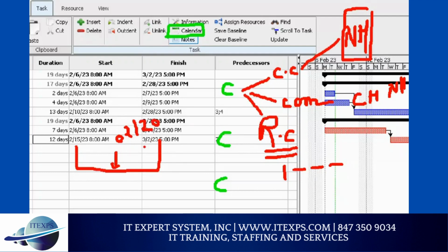So when you are having a precedent day, that day, the calendar will skip and extend that. It will automatically skip. Why? Because national holidays are already known by the calendar. Make sense? If you try to ask somebody to work on Christmas Day, the calendar will not allow you. Make sense or not?